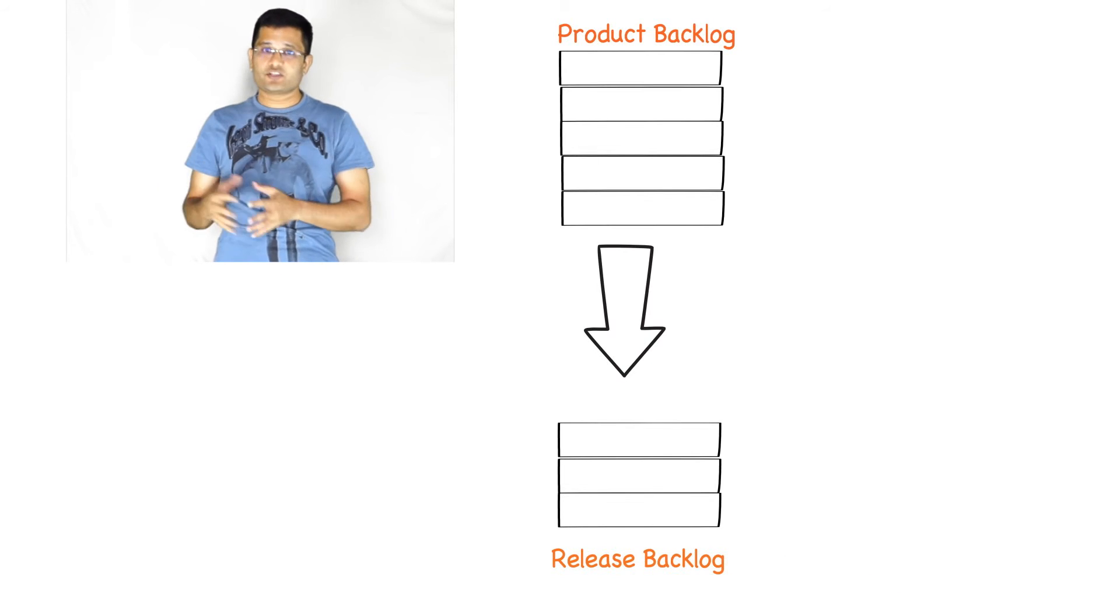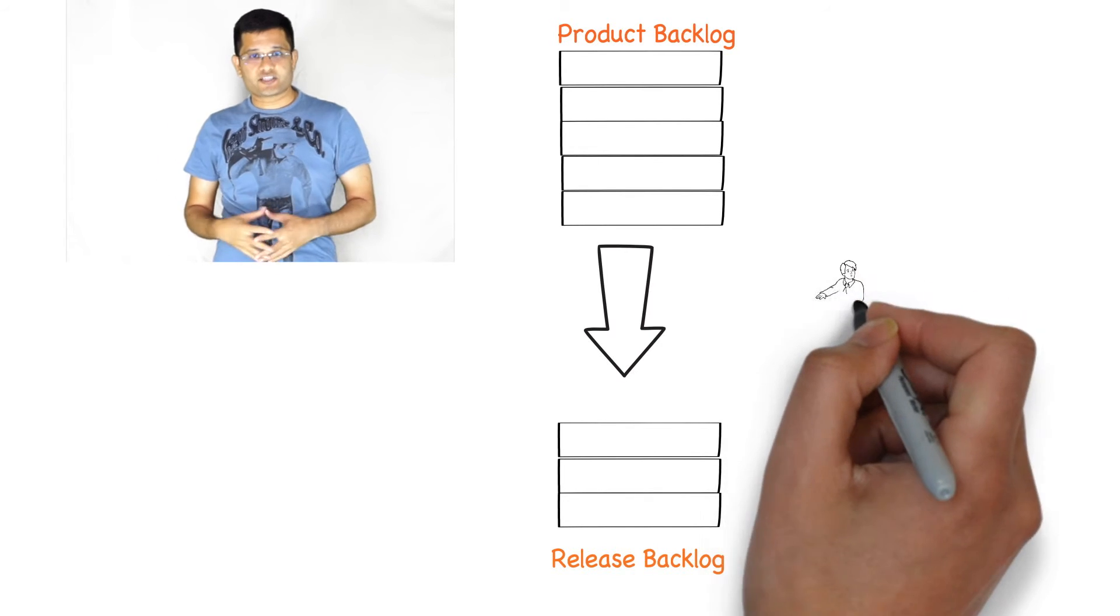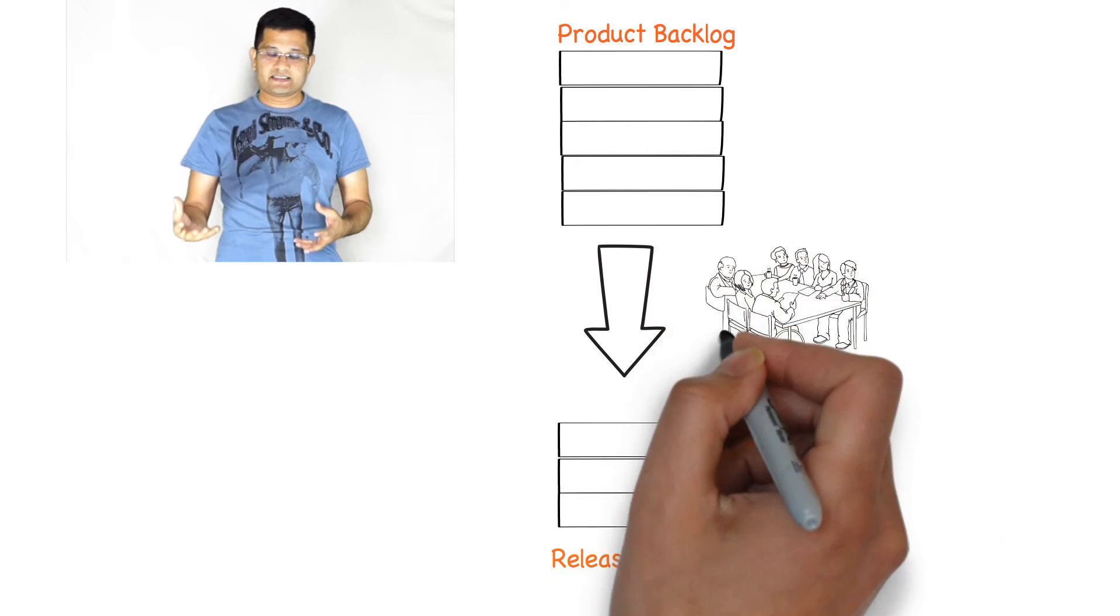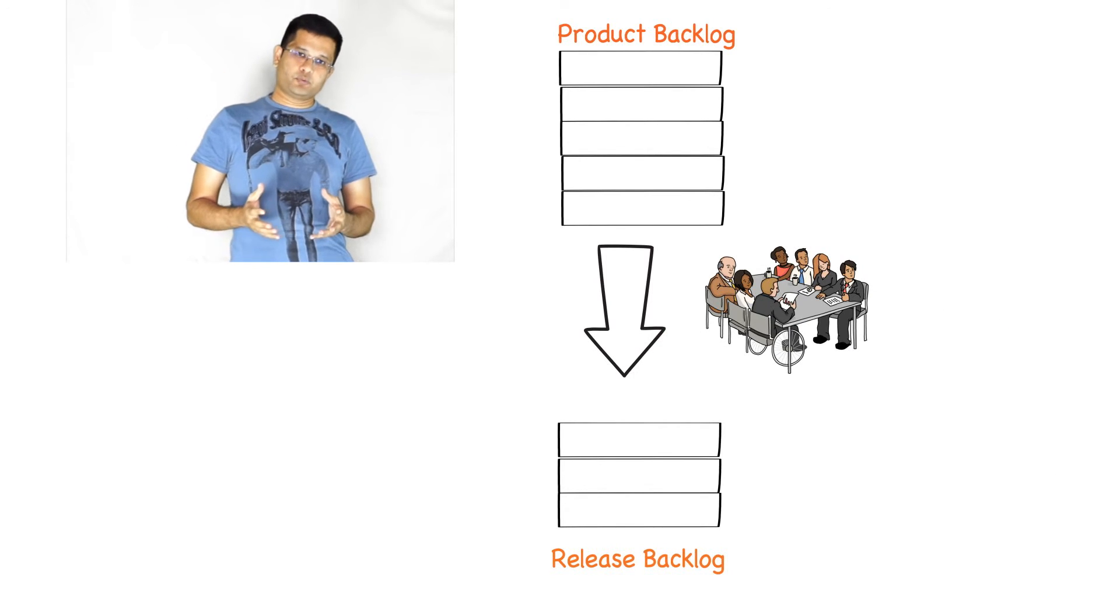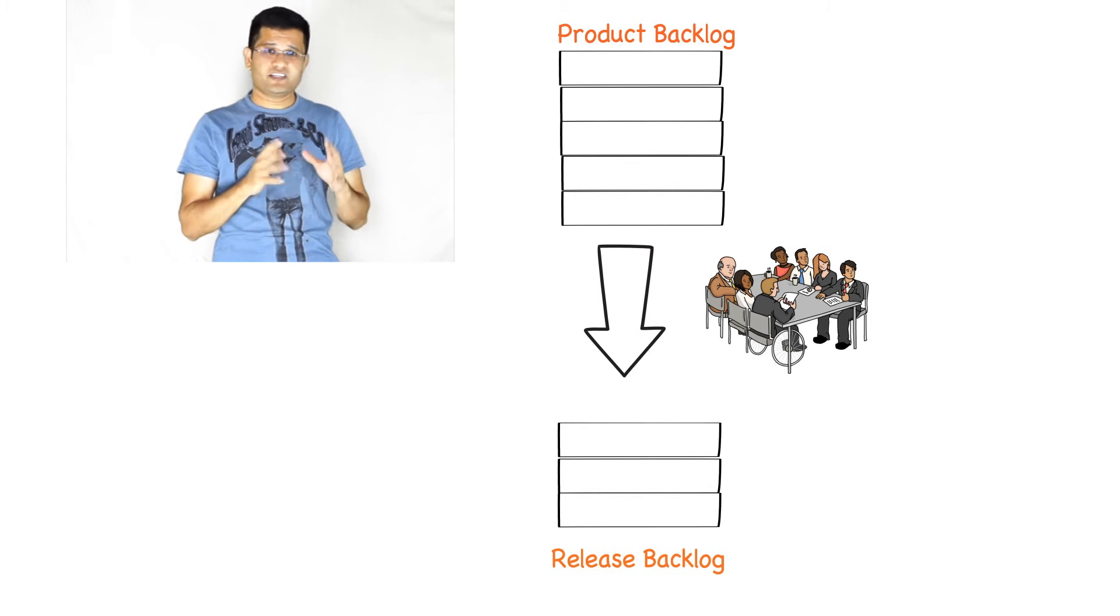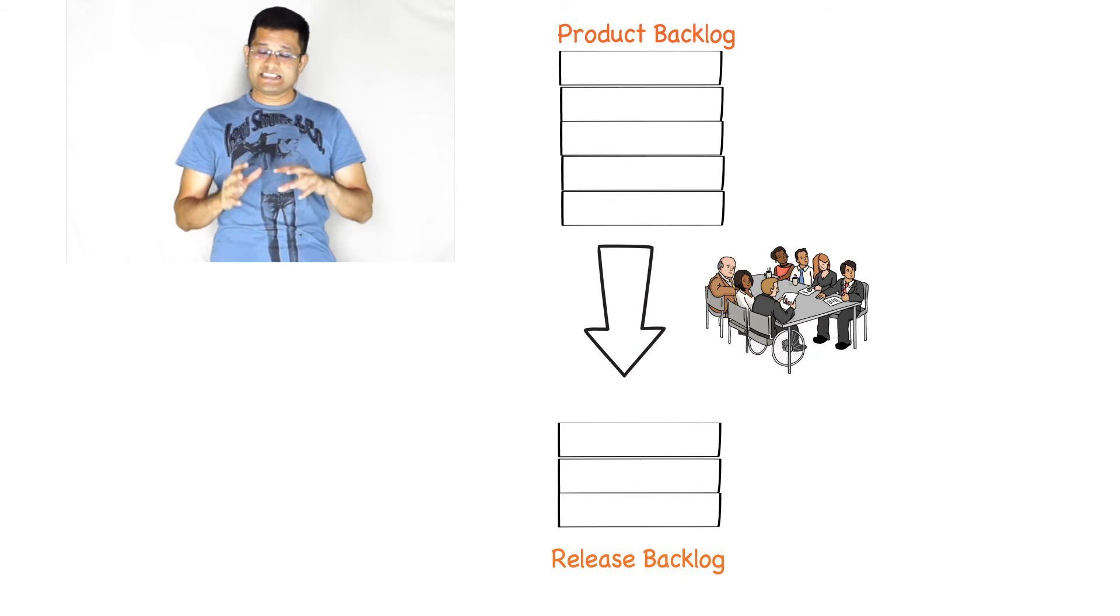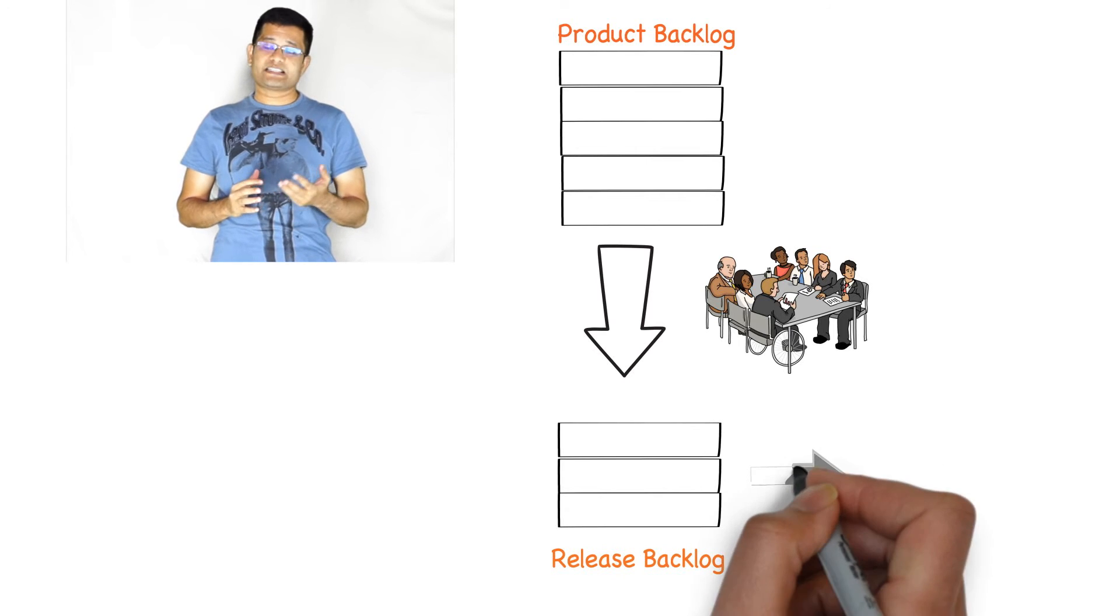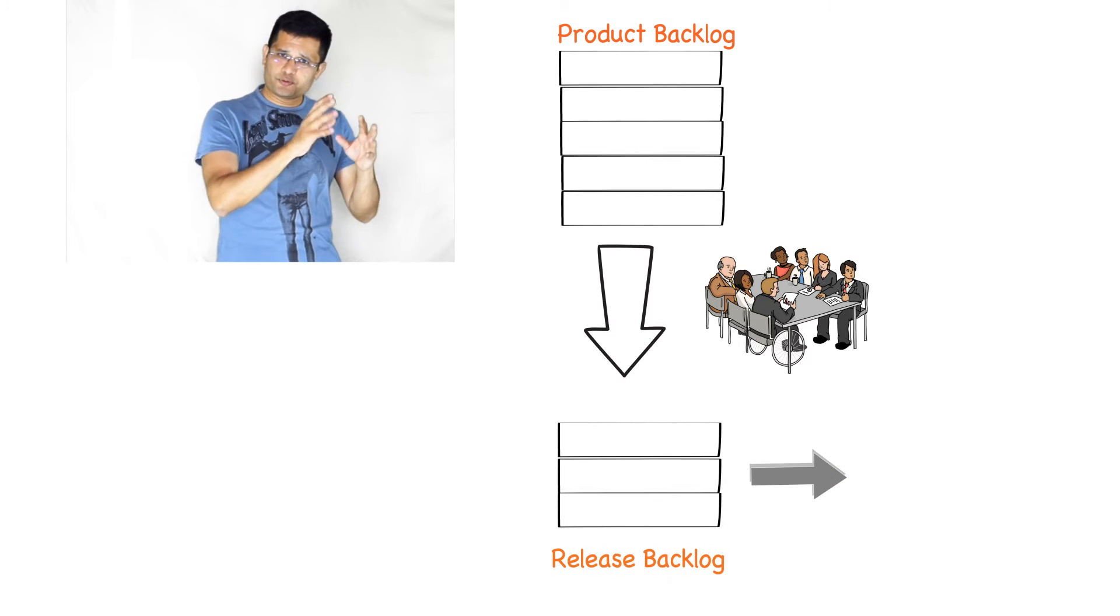Once you have identified your release backlog, you go back to the Scrum team. You talk to the Scrum Master and the team and you explain the product vision and the high level set of requirements that you have at the release backlog. The team spends some time in understanding those requirements and they typically pick up the top two to three requirements from the release backlog and start refining it further.